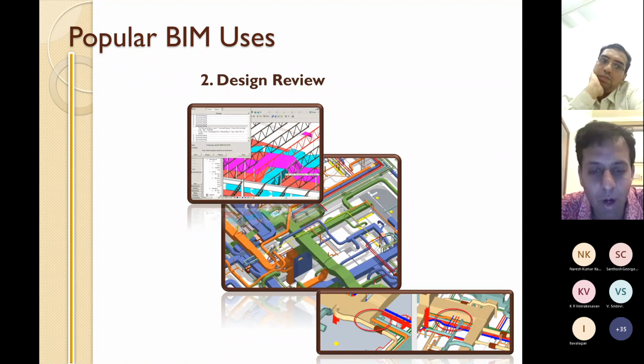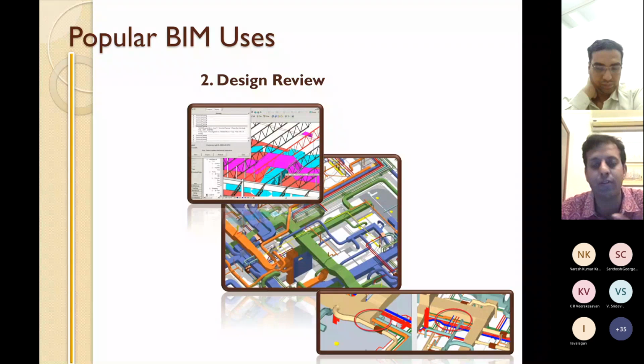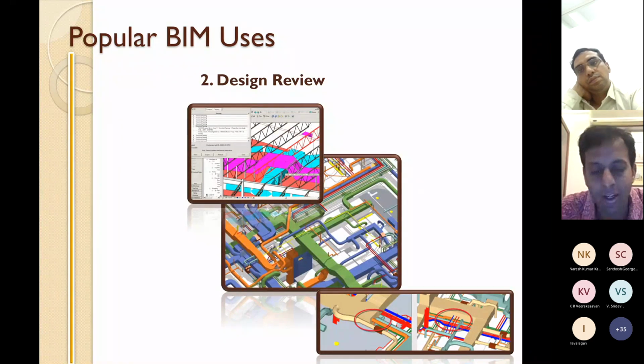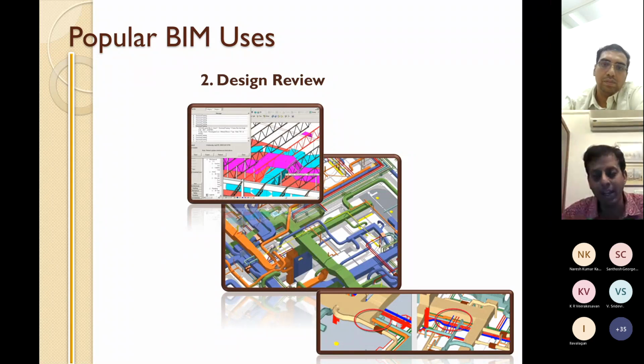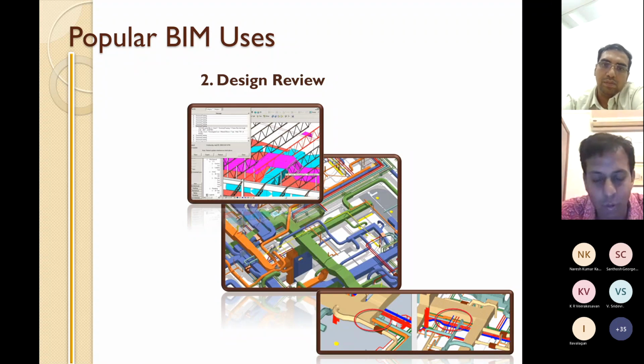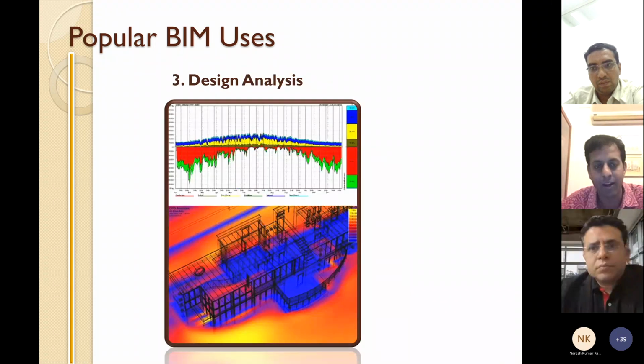And using BIM models, one can very easily understand the relative configuration between columns and beams and pipes and ducts and so on. And again, prior to construction starting, resolve any clashes, as it were, right? So that construction can proceed extremely smoothly, right? So this is again something that can add value to a business, right? If you actually implement it properly, right?